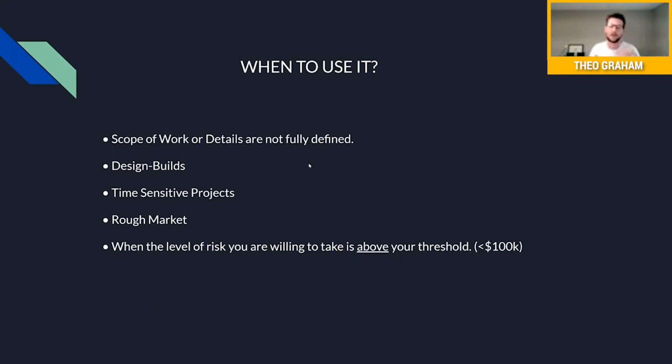We would call it dirt to doorknobs, where you have to have everything defined because you're pricing a certain style of something: hollow core doors, a certain floor, or a certain countertop. If you don't have all those selections made, that can be a clunky process and a longer sales process than with a cost plus model, because you can get someone signed under a professional service agreement before those are all defined, based on budget.